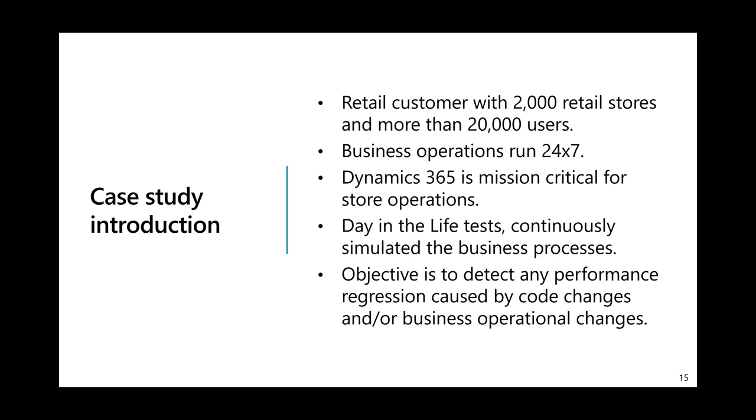So that's why we have to set up day-in-the-life testing in the testing environment to simulate the key scenarios, to find out any unhealthy performance before and after go-live. And we need to perform day-in-the-life testing with continual operation in the system. As I mentioned, the business operation is running 24/7. So our day-in-the-life testing is required to keep running, and we don't stop it until we agree to stop. We also simulate the same maintenance window for each platform update and promotion. It can help to find out the impact between the maintenance window and the business operation.